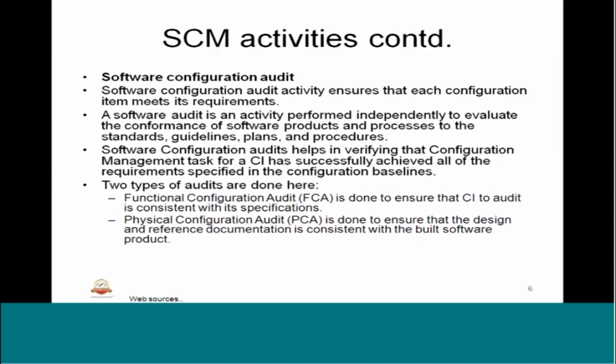A software audit is an activity performed independently, which is very important. This will be done outside the team. Usually QA can be involved, or there is an independent body designated to take care of this audit activity. Basically, they perform independently to evaluate the conformance of software products and processes to the standards, guidelines, plans, and procedures. So there are planned ways of controlling, identifying, and doing the process of SCM. All these SCM activities will be audited with the help of an auditor.